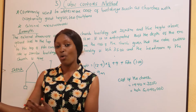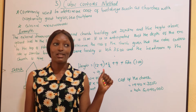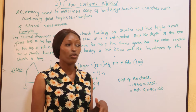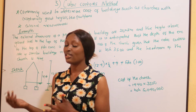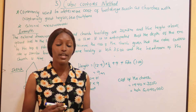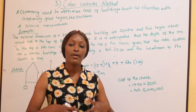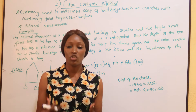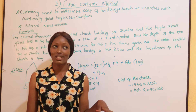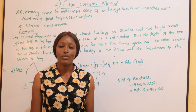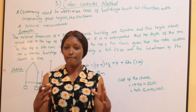In the floor area method, we compare the building to another building of a similar nature whose cost we know. Now in the cubic content method, due to the fact that buildings vary in terms of height and unique features like partitions, quantity surveyors came to realize that the floor area method doesn't work accurately in some buildings — for example, in churches or cinema halls where we have very high pitched roofs. These roofs take a lot of space and cost a lot of money, so they came up with the cubic content method, where we compare buildings by their volume.